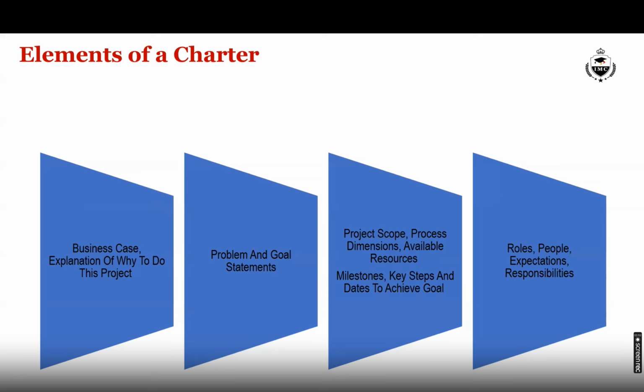And in HR, as we know, there are several areas of work: recruitment process, promotion process, increment process, payroll process, etc. And if a Six Sigma project is being done to improve a process relating to only the recruitment, the project scope should be clearly written that scope in is the recruitment process, scope out all the other processes of the HR department. So that would basically indicate what is the boundary of your Six Sigma project.